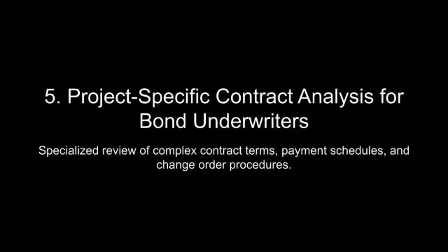In payment bonds, force majeure events can complicate the relationship between contractors, subcontractors, and suppliers. Delayed payments resulting from project disruptions may trigger claims against the bond, even if the delays are excused under the force majeure clause. Sureties must navigate these claims carefully, balancing their obligations to subcontractors and suppliers with the protections afforded to the contractor under the clause.